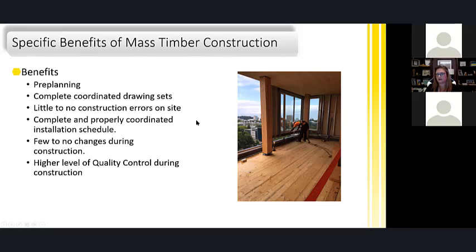We insist on Revit modeling between all of the consultants, and we're really finding this super helpful moving forward. We rely less and less on companies like CAD makers to do all of our clash detections now that all of our consultants are doing proper Revit models. But we still do a back check with an independent company like CAD makers. There's a couple of other companies now that do them, and check and make sure that there's no major clashes.